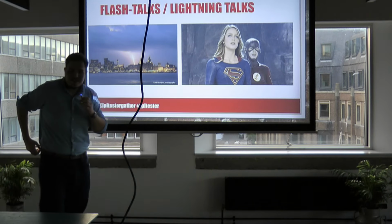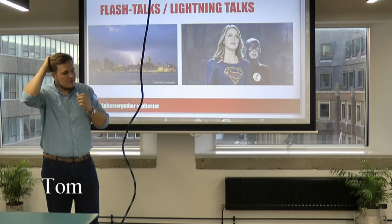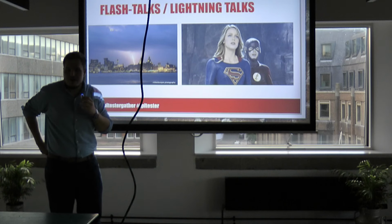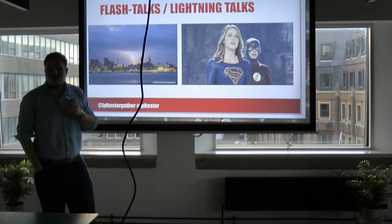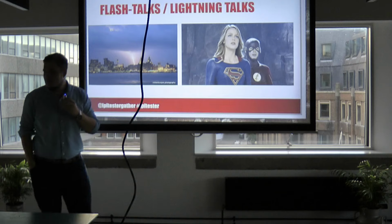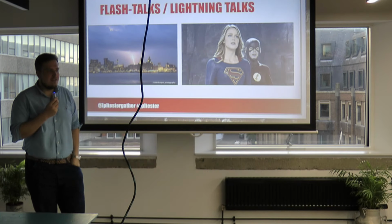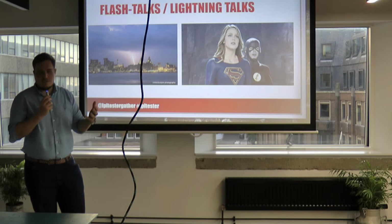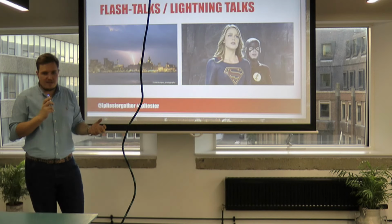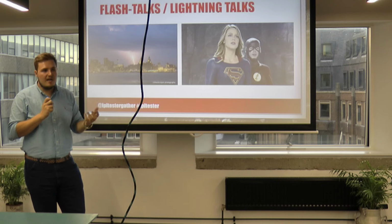So mine's not really about testing, to be honest. It's more of an agile thing. So if everyone's had sprint planning before, I'm going to talk about planning poker and why I like it. Planning poker is essentially a method of estimating upcoming stories and functionality. I think it's a really good way of working. You sit down as a team, everyone in the scrum sits together, and you vote, you assign a number to a story.